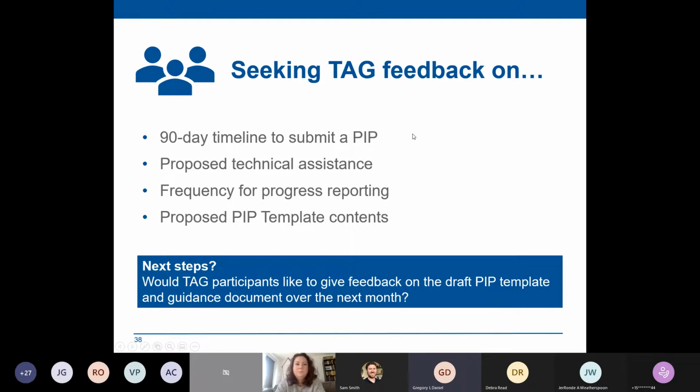I think that when you bring up the idea of contracting, you have to realize the timelines of contracting is going to be way out, because if we talk about the PIP in January, February after it's been filed, you may not be able to even get a change in contracting until the next January. So you may be at least a year out before any contractual changes could take effect.